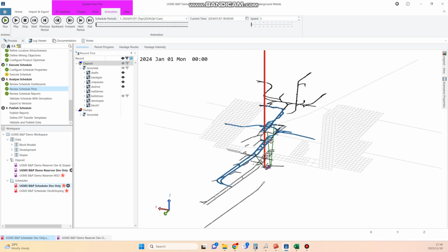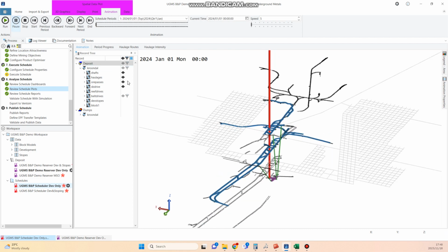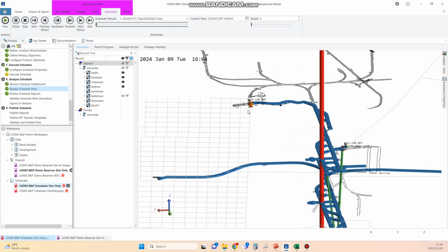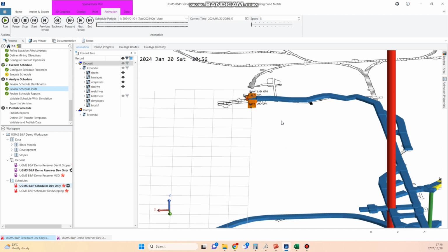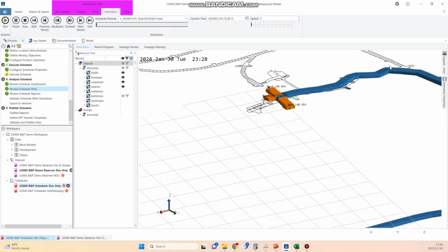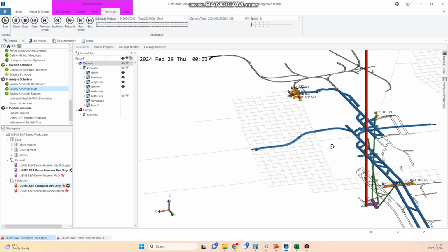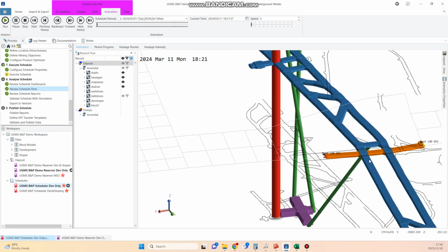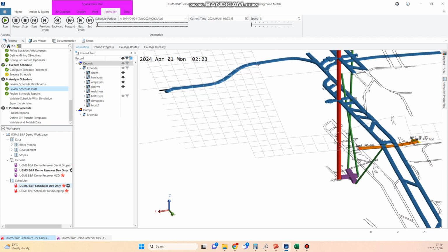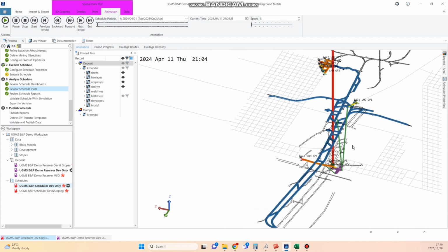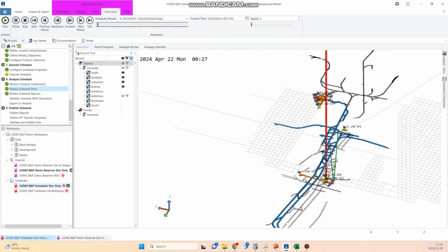So it makes it nice and realistic. If you then look at the animation, you'll see that first of all it starts here. It can only start when there's an actual development. These blue tunnels are the actual tunnels up to date, and then it starts developing from those tunnels. And the same towards this side here. This is your existing actual tunnels, and they're developing in both directions. So this is highly configurable in which direction you want the development to take place.